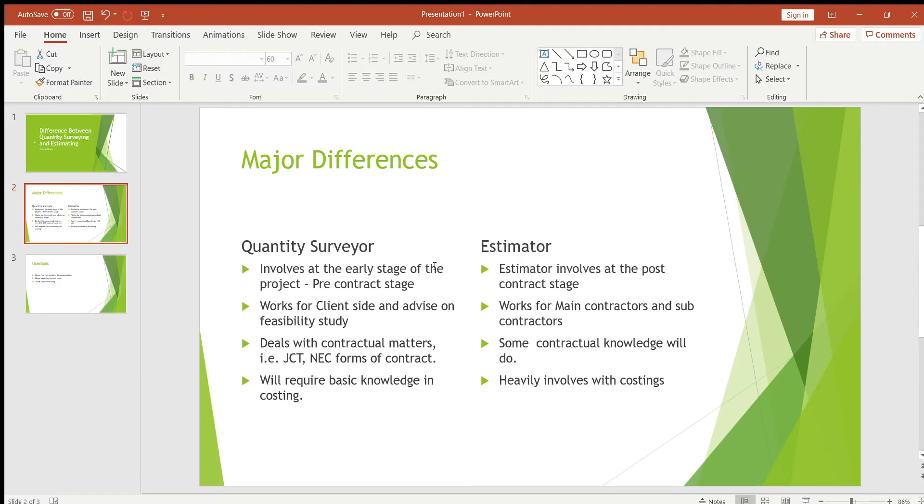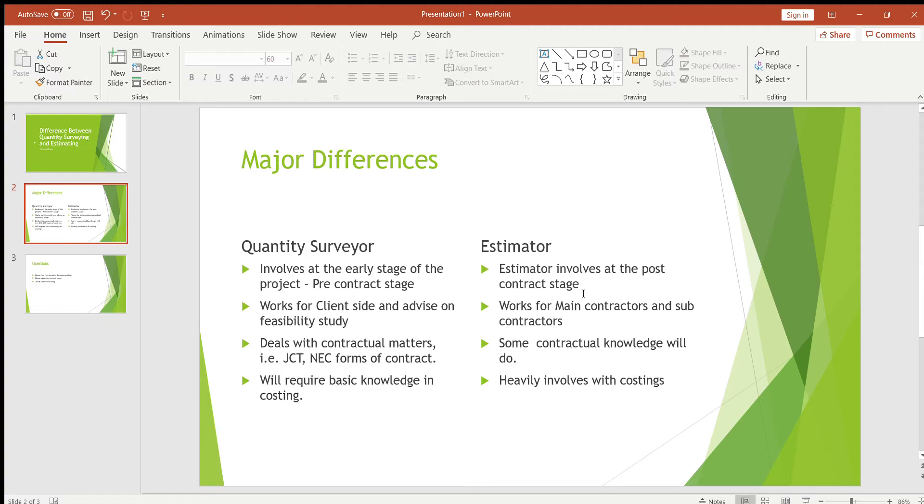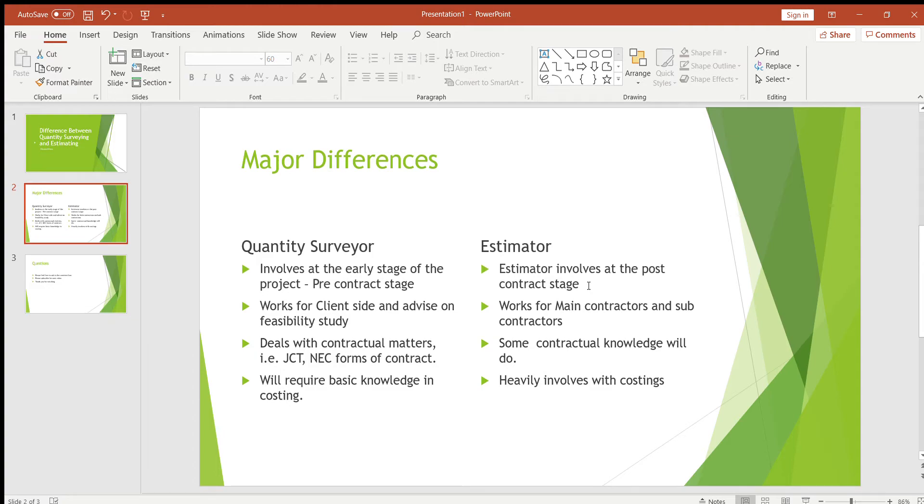These are the differences between quantity surveying and estimating. Quantity surveying involves at the early stage of the project, i.e. pre-contract stage, whereas estimator never involves at the pre-contract stage. Estimator involves at the post-contract stage, so once the project has been awarded and passed to subcontractor or main contractor, then the estimator gets involved. That's the first difference.